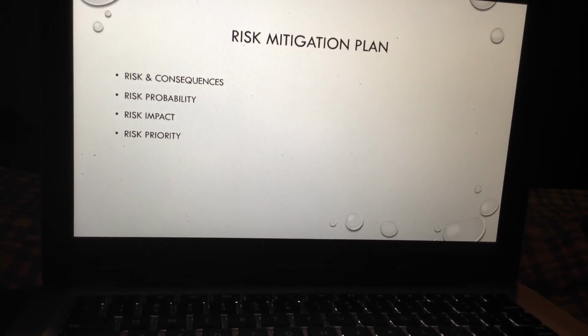And the priority is that I applied the probability and impact matrix that I found online, and I used the likelihood of patient information being hacked when there's lack of cautious use of unauthorized internet connection, and the impact and the consequences will also be high. This can cause the patient to experience theft and also have the organization undergo legal proceedings.